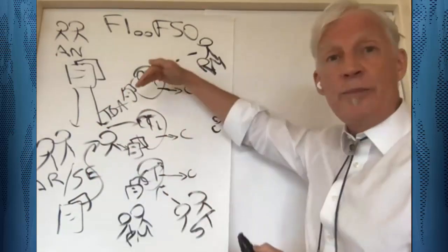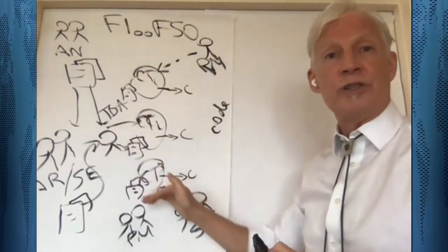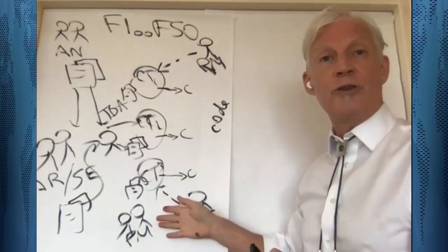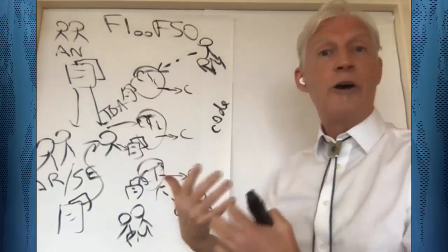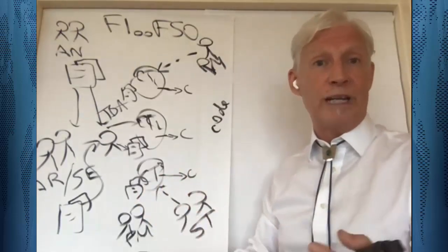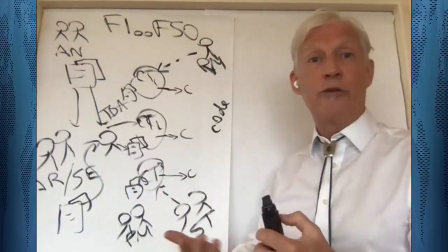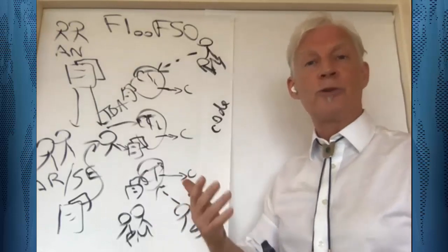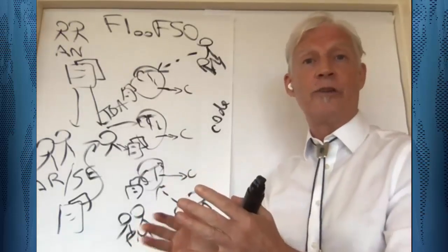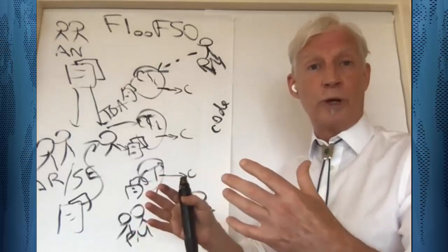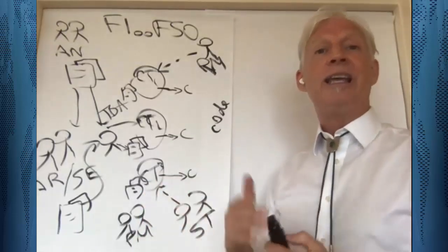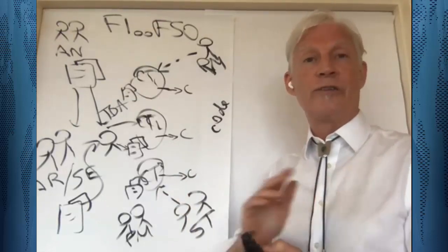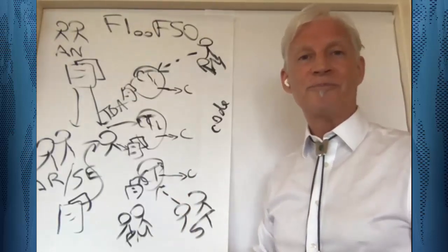the elimination of the manager positions of the old existing groups, the elimination of middlemen and project managers and coordinators, because now there's simplicity, so there's no coordination needed. Tracking is trivial because there isn't people doing partial work. And it's possible to show that that kind of an organizational design based upon many feature teams working together on the same product is consistent with adaptiveness, or in other words, low transaction cost and low switching cost.